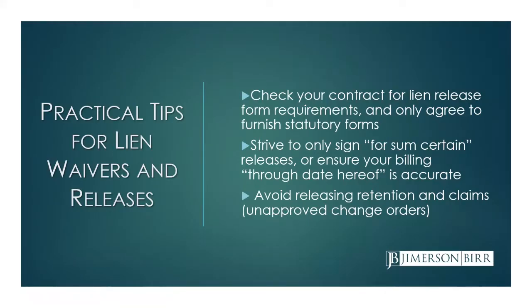Some practical tips: check your contract when you're negotiating your contract. Look for lien release requirements. What is the type of lien release? What rights are you required to give away? And only agree to use the statutory form or a form that you approve. So that's when you're negotiating your contract, and it's something you should pay attention to.